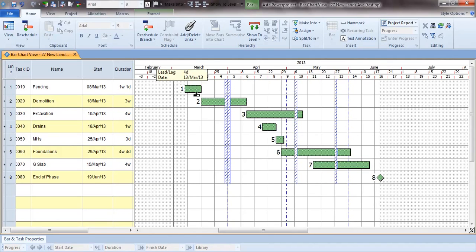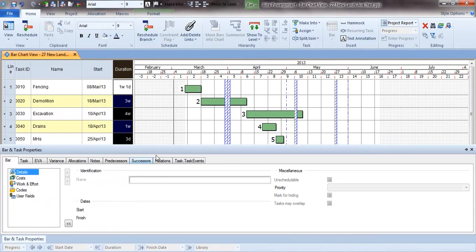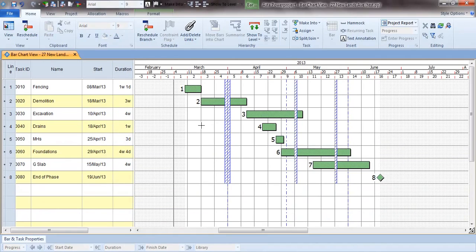So we could either have a long list at the beginning, or we can sketch them out where we think they go. But if we wanted to say, well, we do have to finish the fencing before we can start any demolition work. In PowerProject, whilst you can edit the links in columns and in tables, most people find the best way of doing it is by drawing it on the body of the plan, because in doing so, you're also introducing the link type and the link lag.